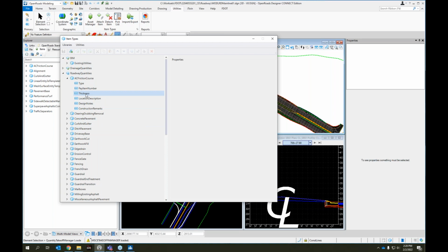If you do not update this, it couldn't read that value. Now keep in mind, this thickness is only used for 2D computation for these tonnage items. Tonnage for 3D meshes is calculated from the volume. For 2D, if you were using 2D shapes in your QTD SRD, say you were doing just a 3R project or something that you weren't completely modeling, and you were using your QTD SRD to create 2D shapes, at that point you would need to enter the thickness, because from a 2D you have to take the area, multiply it by the thickness, multiply it by, it has the formula, and it needs that thickness value to compute off the 2D.